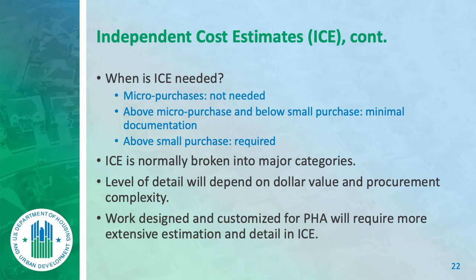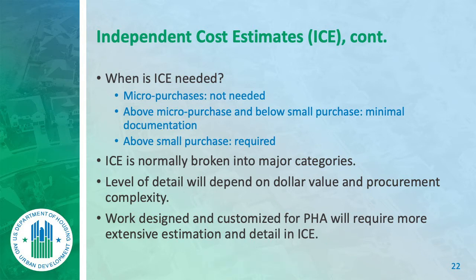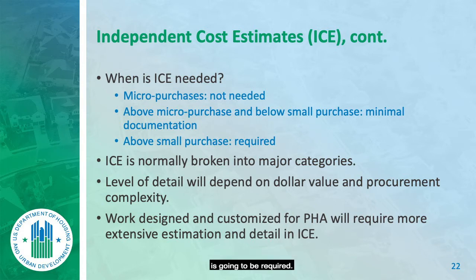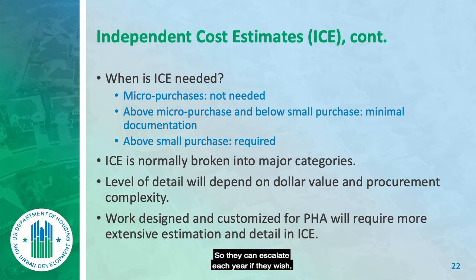Above the micro-purchase threshold but below the small purchase threshold of $60,000, only minimal documentation is required — though personally I do ICEs the same way for everything and attach any backup. Above the small purchase threshold, an ICE is absolutely required. For anything above $3,000 in New Mexico, it's required. ICEs can sometimes be broken into major categories by annual audit year, so costs can be escalated each year if needed.